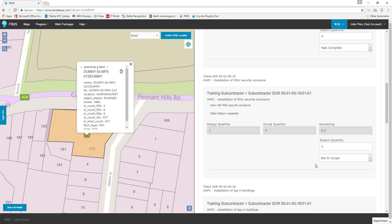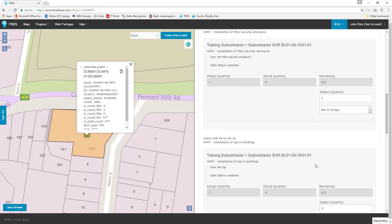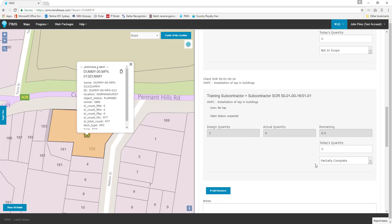Our SOR for the installation of MDU security enclosures has an actual and remaining quantity of zero, so nothing needs to be done here. The last SOR on our list is the installation of taps. We have an actual and remaining quantity of four taps to be installed. Let's report that we've completed the installation of two taps.